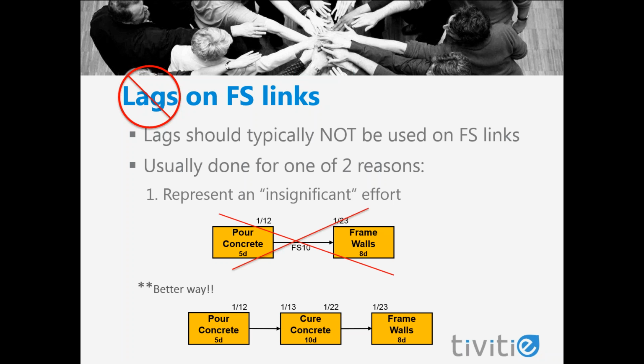However, it's much better if the lag represents something happening, even if it seems unimportant, to go ahead and add a task. That way you have the visibility to what's going on, and anyone else looking at your schedule will also understand what those 10 days are representing.